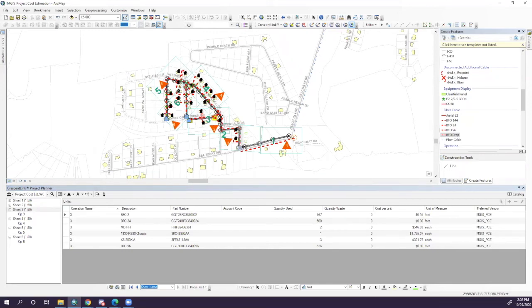Well, what we can do, like we went over earlier, is basically tie this data in to existing, I have a CSV file here, like I said, a rate sheet, existing rate sheets, inventory information, things like that, to basically assign values and build unit summaries, to build cost estimates of this entire job, and to get a list of all the materials I'm going to need for this job.